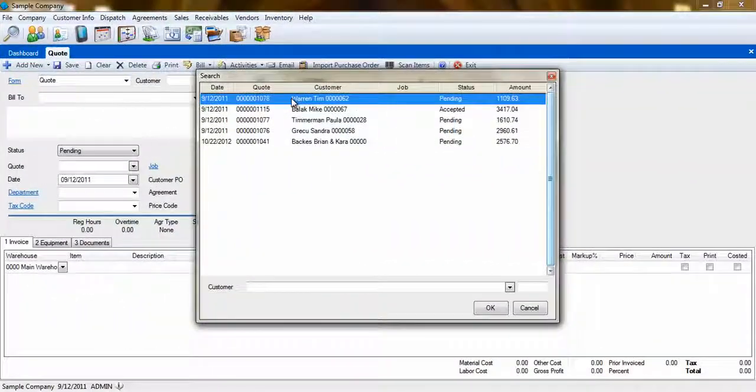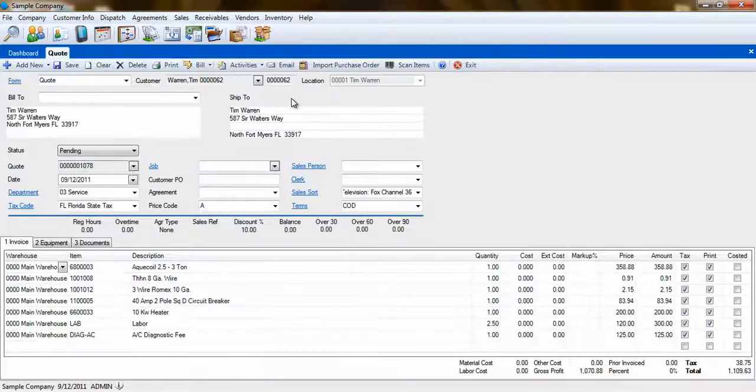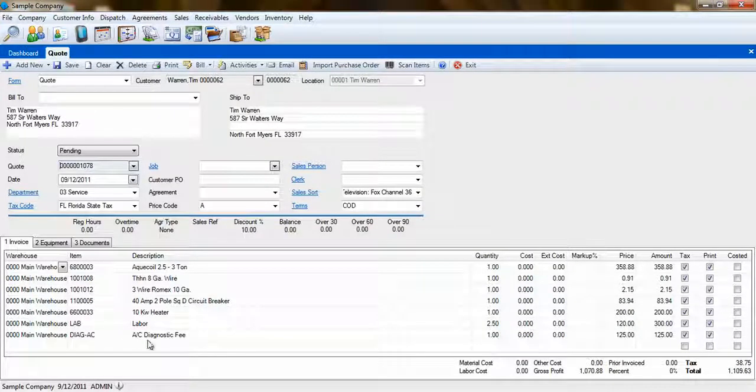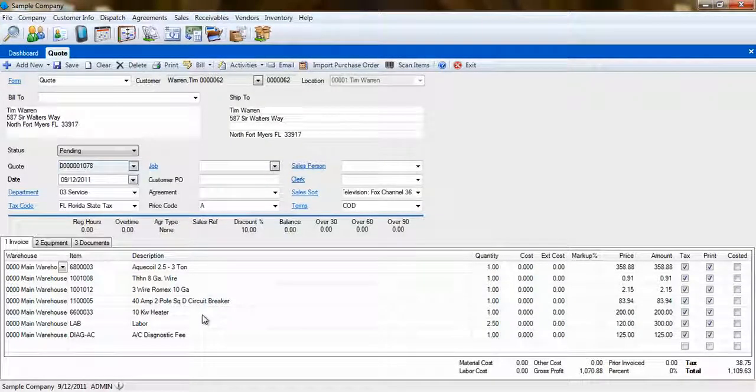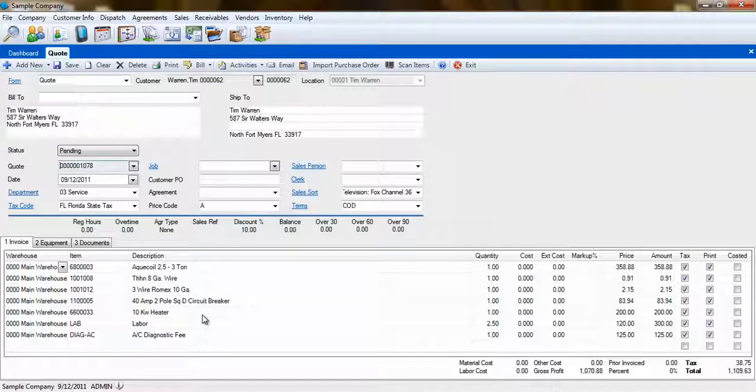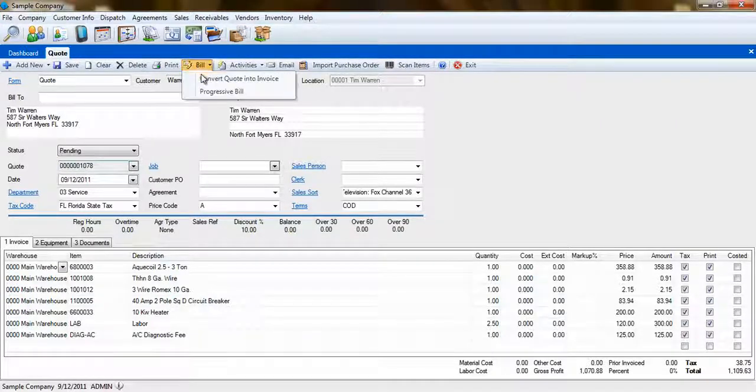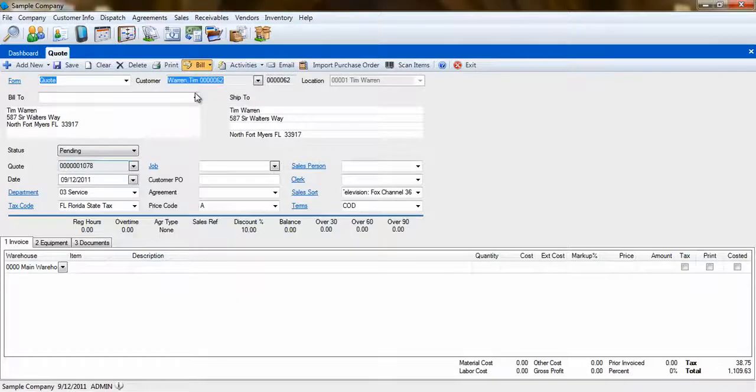Now it's time to create the quote. Here, I have an example of a quote with a variety of items already added to it. In order to begin progressively billing this quote, simply select the Bill button on the toolbar and then click on Progressive Bill.